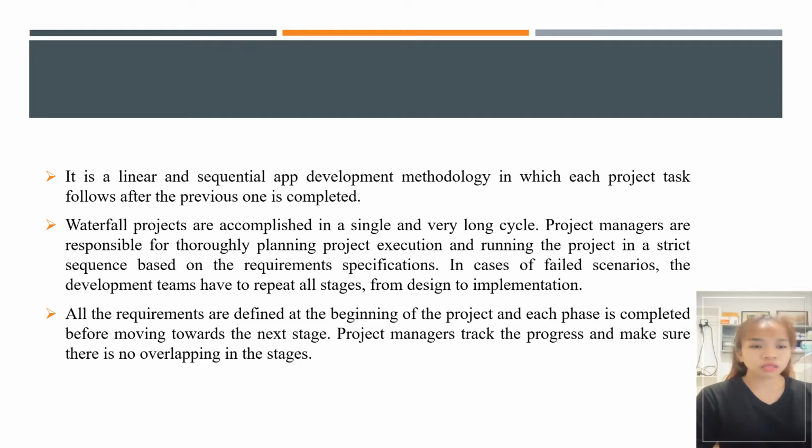Project managers are responsible for thoroughly planning project execution and running the project in a strict sequence based on the requirements specification. In cases of failed scenarios, the development teams have to repeat all stages from design to implementation. All the requirements are defined at the beginning of the project, and each phase is completed before moving towards the next stage. Project managers track the progress and make sure there is no overlapping in the stage.